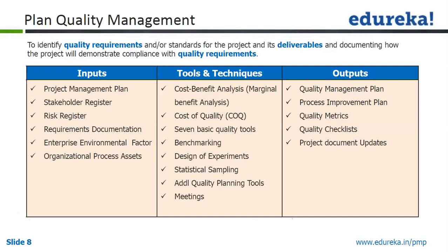Then the quality checklist. This is a simple checklist. Usually you should use the acceptance criteria, which should be included in the scope baseline. So the quality checklist should be incorporated into the acceptance criteria, and it is included in the scope baseline. It's a structured tool, usually component specific, used to verify that a set of required steps has been performed. I think we all know the checklist and we have been using it. So that's the output we get as part of the plan quality management process.